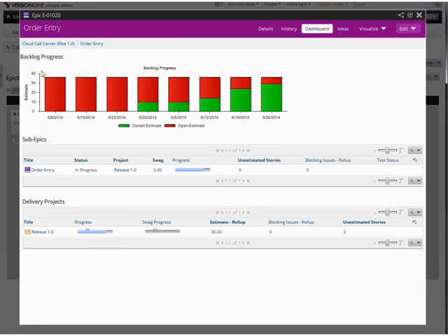And epics have a dashboard panel that allows us to understand the work that it takes to build this feature in one place. So looking at just this feature, we can see the amount of backlog that we have committed and that we have completed for this feature. Again, this is another place where if you see these bars start to jump up, it's an indicator that more work has been added to this.